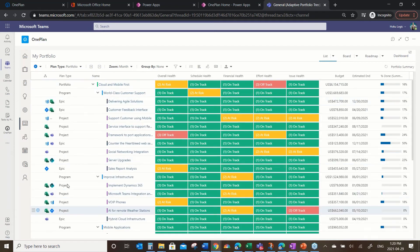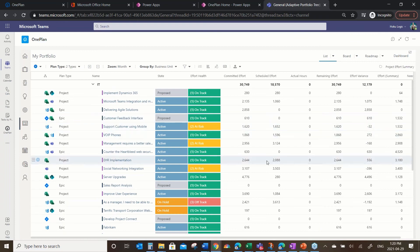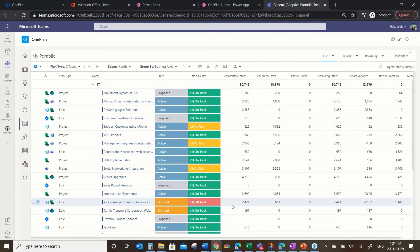I'm going to drill into my portfolio quickly. You can see I've got lots of different projects in here. I'm going to pivot to my project effort summary view — kind of an executive-type view showing scheduled versus committed effort, remaining effort, and so forth. You can see I've got some projects that are at risk because our schedule effort exceeds what we had originally planned. There's one down here that's quite a bit offside, so we might want to dig into that. But this gives us a very quick view of where we are with these different projects regarding resourcing.